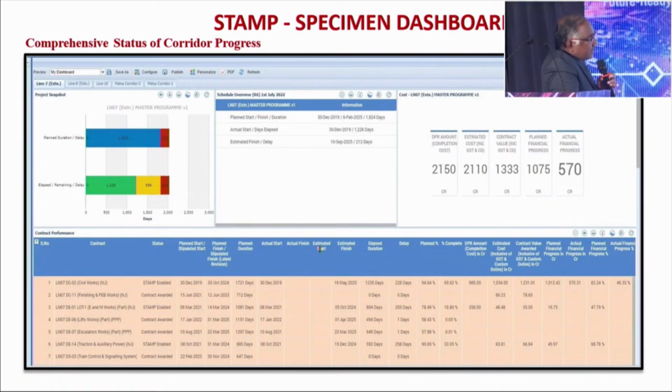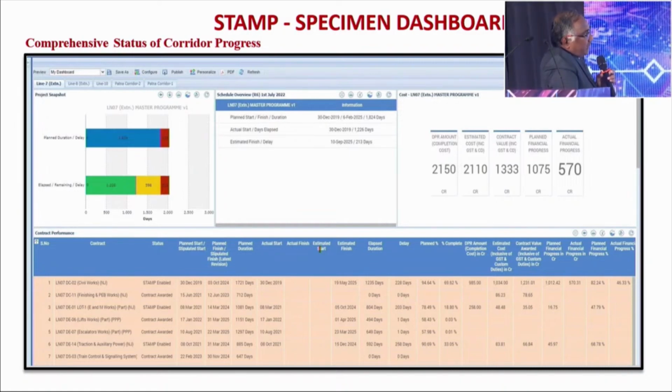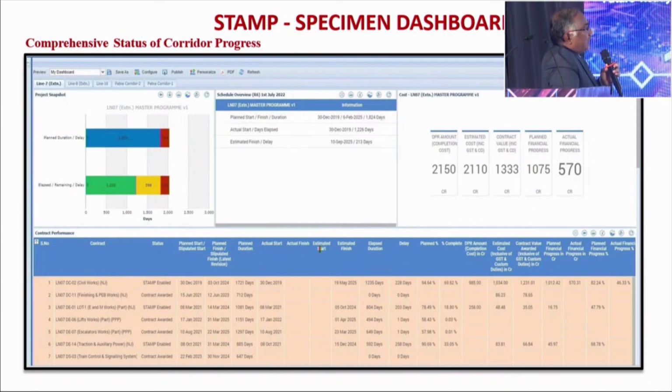date. Actually, this scheduling is done on a weekly basis for every DW, Primavera schedule. That is done every Sunday late night and early morning of Monday, so that from Monday onwards you will be able to know up to the last week. So what are the exact things on your S-curves? Basically, on a real-time basis it comes to the dashboards. But the estimated finish and all will be calculated every week, and your S-curves will be reflected on a weekly basis.